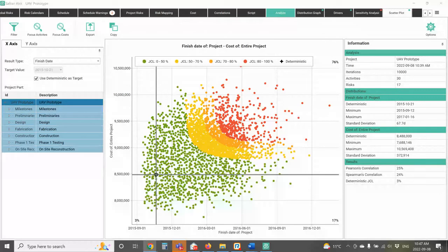So every time you had a half hour calendar, you'd get this half hour error in the calculations. Safran does give you a very useful layout when you do an import that shows you a comparison of the results coming from P6 and the results coming from Safran, so you can see if there's any issues and you can fix them. But it does happen, and usually it's around calendars and things like that. So it's something you always want to check before you run the model.